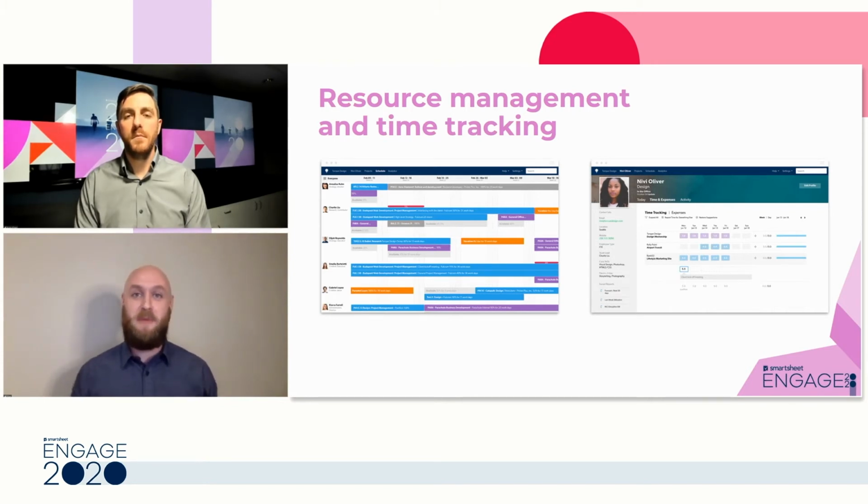Obviously we've taken a step up from there, and we're currently using Smartsheet in couple with 10,000 feet to do all of our resource allocation, forecasting, et cetera. We have the entire organization in it. They're tracking their time. They're forecasting how much they're working on a project and changing it over time. And this coupled with also a skill set matrix that we implemented using people custom tags in 10,000 feet is really giving us the best fit resource.